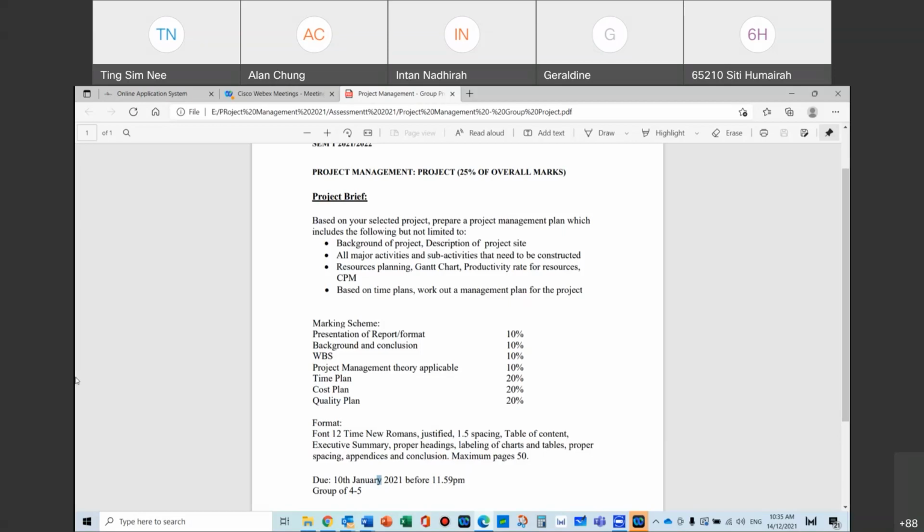Oh yeah, Dr. Ting, since we are talking about a detailed estimate, let's say we own the machine. Then technically we don't need any hiring cost, but we need maintenance cost. Do you need to show that maintenance cost? Yes, because when you come up with the rate for that machine, you need to tell me how you come up with the ownership rate, meaning there will be an ownership component and a maintenance component.